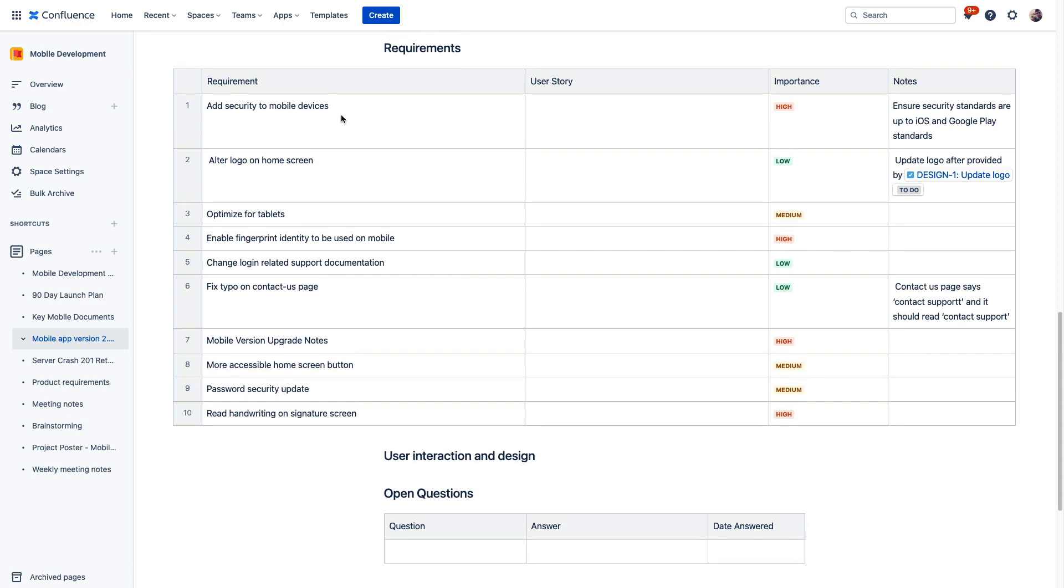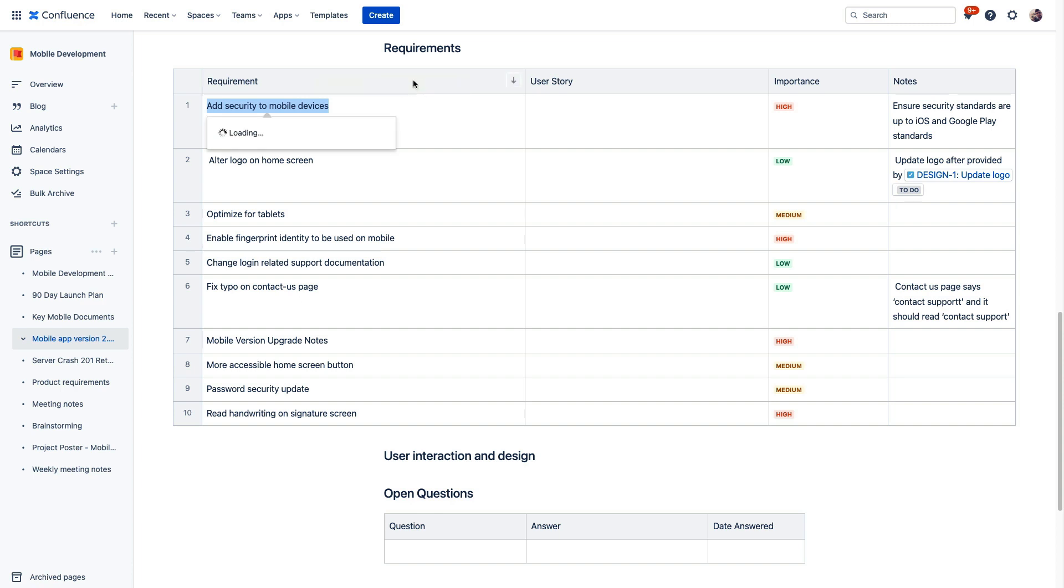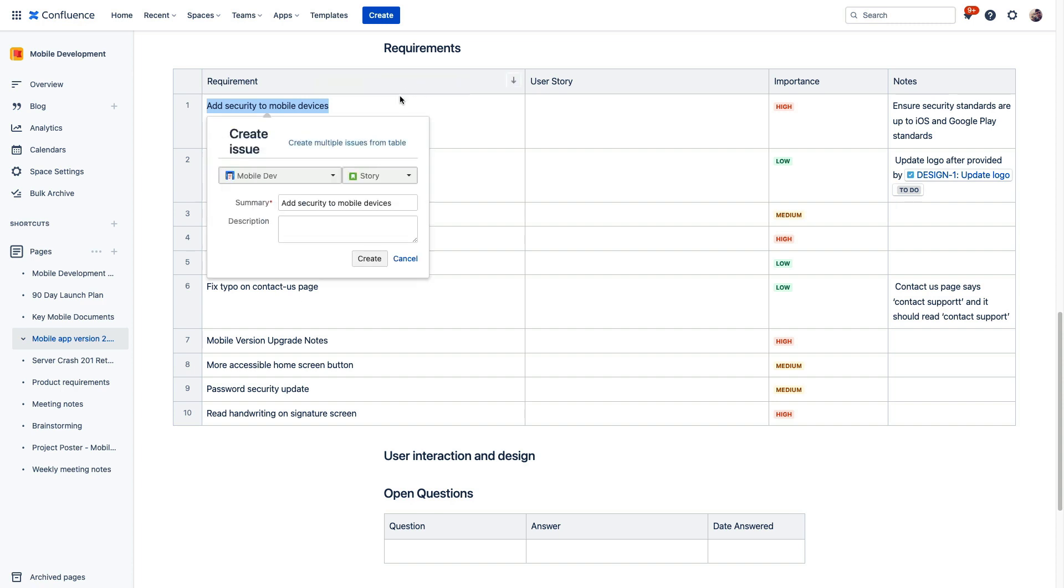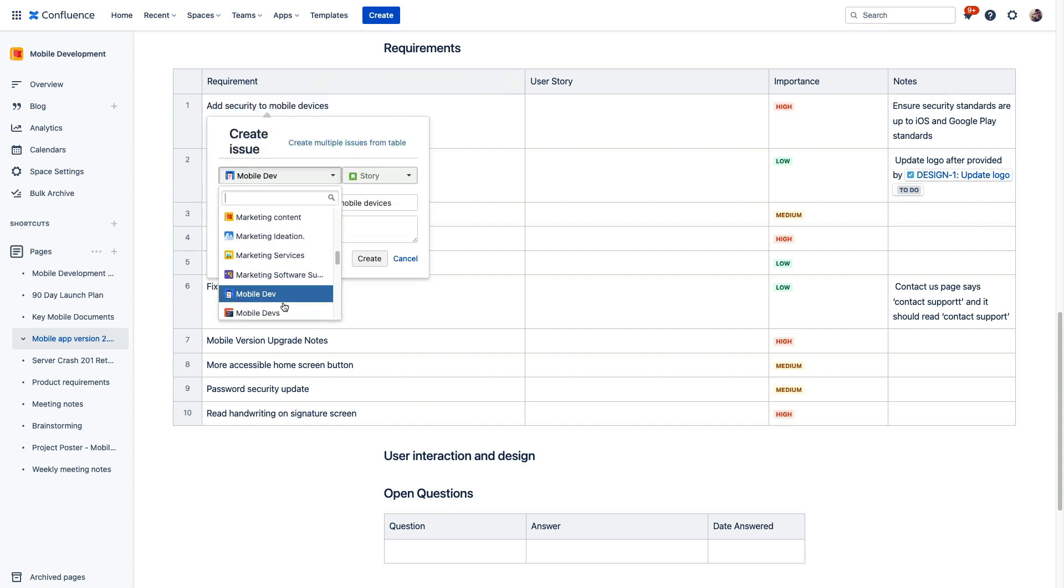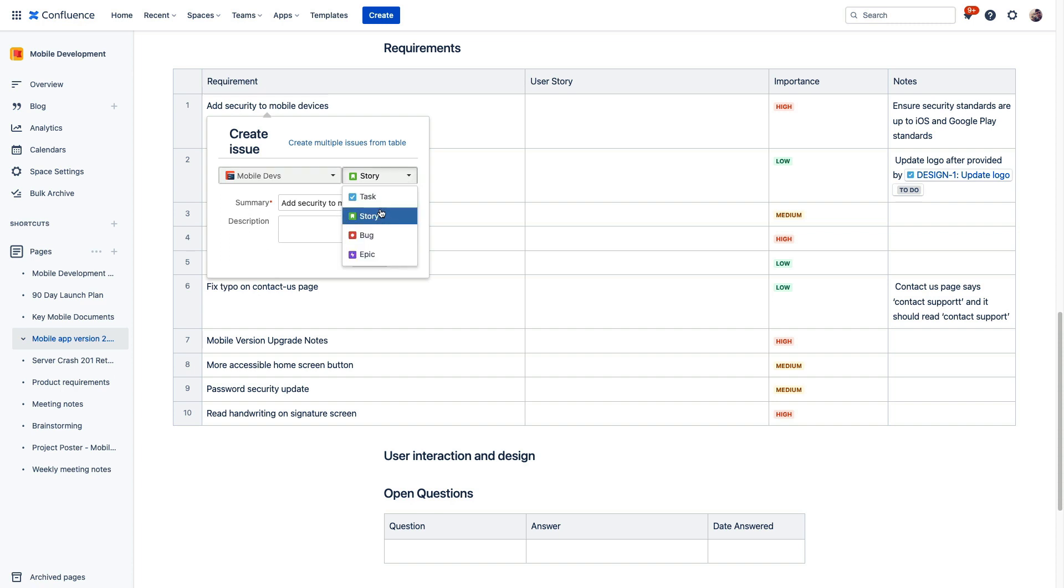Now, instead of individually creating issues in Jira for each of these items, we can instead highlight this text directly in our planning page and choose Create Issue. We'll make some quick selections to indicate the project that we want to send this to and the issue type, and we'll just click Create.